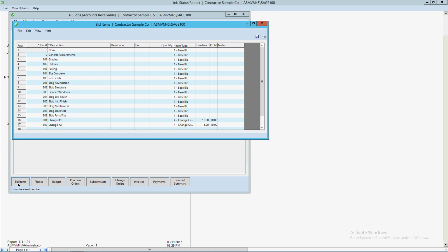What it allows you to do is take a job and divide the bid so that the customer themselves, they want to have it broken down into the following component parts. Therefore, you can set it up so when you're doing the estimate, it shows up in here. So all of this stuff is tracked so you can actually prepare the proposal in the format that the customer requires. Okay? That's what it's doing.